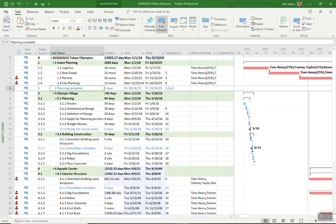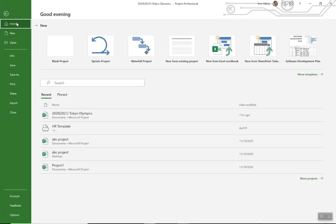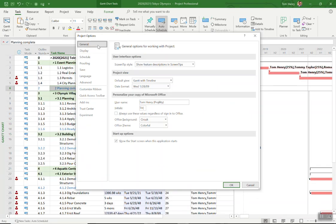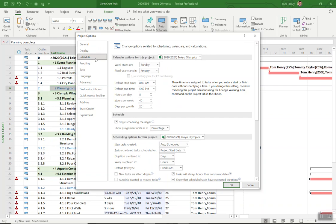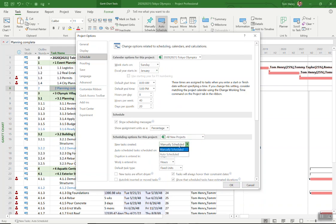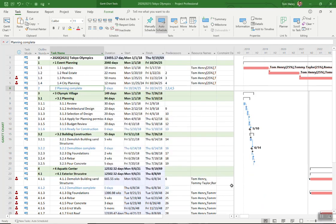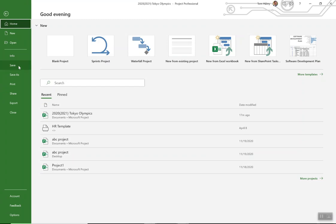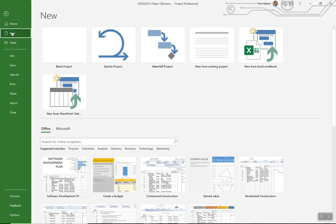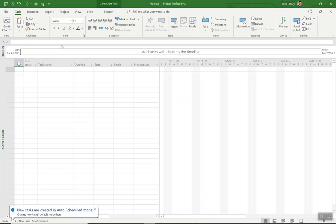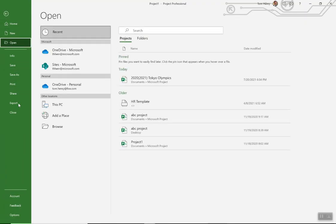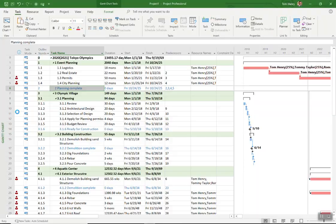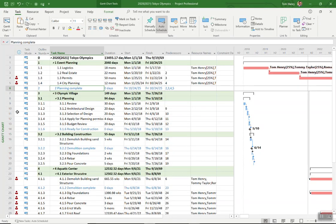I've made those all auto scheduled. What you want to do is come down here where it says new tasks. Always make sure that you come in and set that, that is not manually scheduled but auto scheduled. You can also do that in project options. So file options and you can come in here and say that for all new projects that it's going to be auto schedule. That's going to save you so much trouble because most people like to use the scheduling engine. It's one of the key benefits of leveraging Microsoft project.